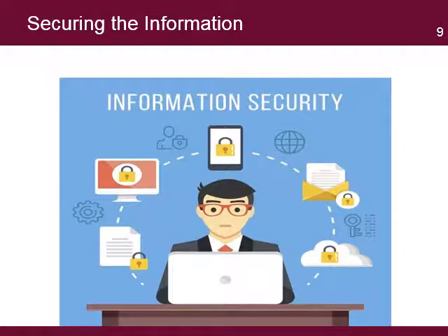All project information needs to be classified as either private or public. Public information is available to any person, and its contents do not compromise the rights of any beneficiary or person mentioned in the information or the security of the project and the organization. In the case of digital information, the project will need to put measures in place to encrypt the documents or databases to keep outsiders or non-authorized personnel from opening and reading it. In the case of paper documents, a file cabinet with a lock or a secure room should be considered as appropriate methods.